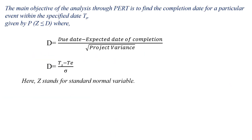The main objective of this analysis is to find the completion date for a particular event with a specified date. The probability is given by P(Z ≤ D), where D = (TeS − Te) / sigma. Here, TeS is the due date, Te is the expected date of completion determined by the critical path, sigma is the root of project variance, and ZD is the standard normal variable.